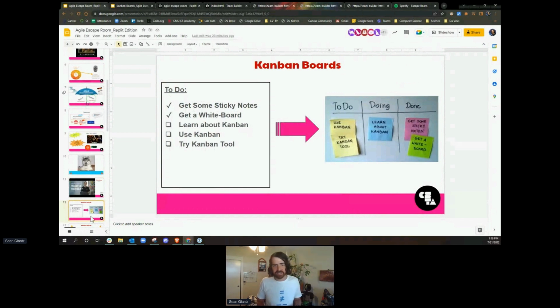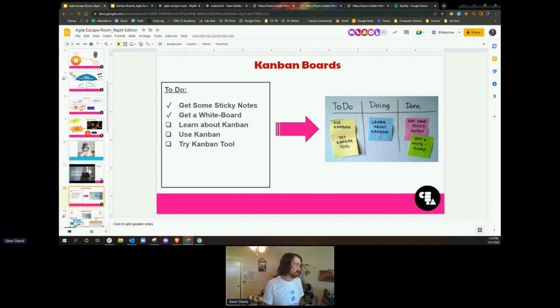Anyway, they introduced Kanban, and the simplest way that I can describe it is it's taking a to-do list that we're all used to, right? Which is just a checklist. And it's moving it into this at least 3-column chart where now you take a task from the to-do list, you put it in the doing column. Now you've got this nice visual indicator that this is in progress, right? I don't really have that information in a regular to-do list. So knowing that something is in progress is really helpful when you're collaborating, especially if it's asynchronously and things like that. And then, is it done? When it gets finished, you put it in the done column. Just that little tiny shift can be a really powerful change.